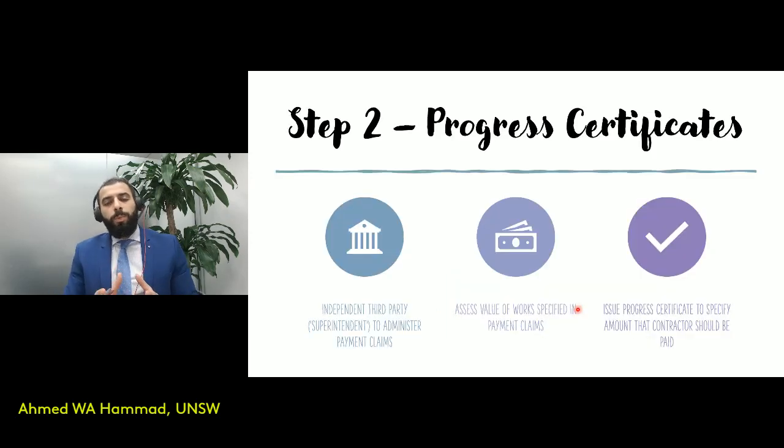So that was step number one. Step number two. Over here, we're talking about the progress certificate. The claimant has already made the progress claim for the payment. Step number two involves an independent party, referred to as the superintendent. The superintendent can be your engineer or your architect, for example. And this third party would administer the payment claim.